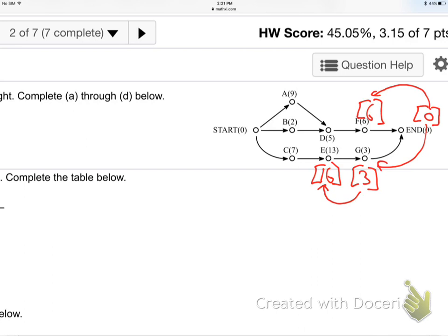That's what we really need to look at, is how far to the end, how much the path costs. We need to get on the bigger paths right away. Get the employees working on the bigger paths, not just the individual jobs. Okay, one more. So to define that, you just add backwards. So the next one, just add 7. What's that, 23? Yeah, 23. So see what I did? 0, add 3 is 3, add 13 is 16, add 7 is 23. So I'm just adding backwards. It's basically all it is, add backwards. But there is one trick.